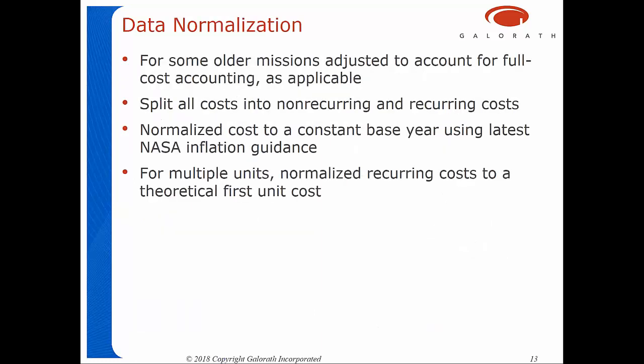Data normalization applied to this project for some older missions that we adjusted to account for full cost accounting, not all the older NASA missions. We use recent CADRe, but those that are older than about 15 years ago didn't include the government oversight costs. That's what I mean by full cost accounting. So we had to adjust for that.